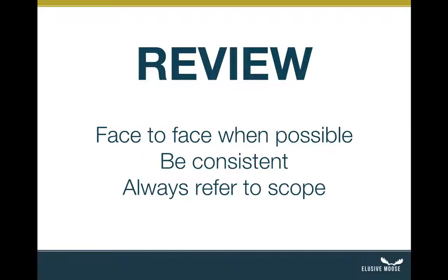Maybe you just estimate it at a very high level, and it's like, well, we're going to do contacts, and we're going to do invoices, and we're going to do inventory, and that's as far as you go. There is some sort of scope of work in place. The Agile framework that I use is written from a user perspective, so the user will be able to perform a task, run a report, et cetera. That is my scope of work. I'm always pointing to that scope as the part I'm reviewing, and the reason is to determine what is suggested that is not within that scope.